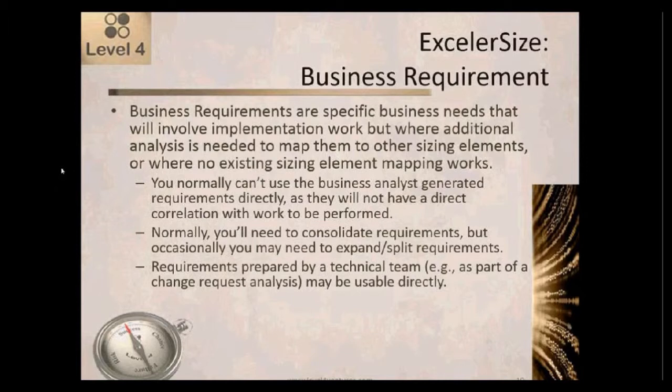You normally can't use the business analyst generated requirements. So business analysts will normally have done work and have a list of requirements that the application is supposed to meet at some point in time. And generally speaking, you cannot just count those requirements up and say that's how many business requirements you have. Because the business analyst generated business requirements will not have a direct correlation with the work that needs to be performed by the development team.